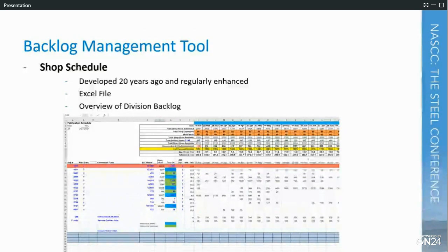And so we're having that information there in the middle, but the information on top is where we have our current manpower levels, and we identify what our overall production capacity is based off of our manpower levels. So we have X number of employees that week in our shop. We have 10% indirect hours, so 90% of those hours are going to be direct labor function hours, and so that's going to be the available capacity.